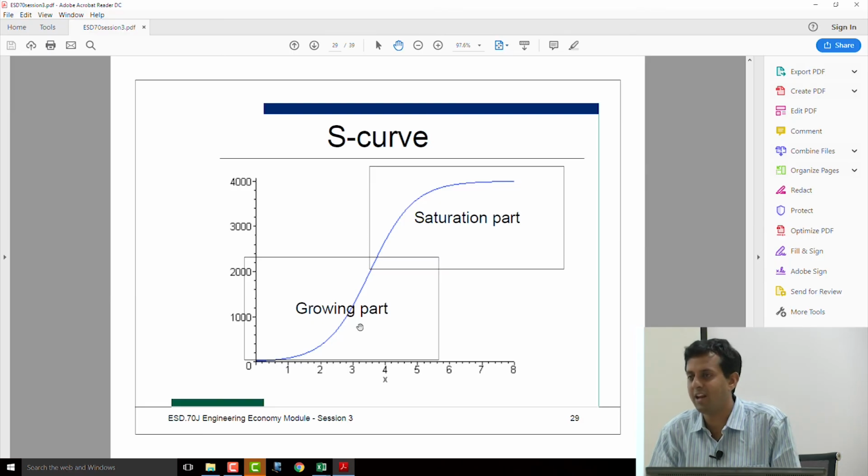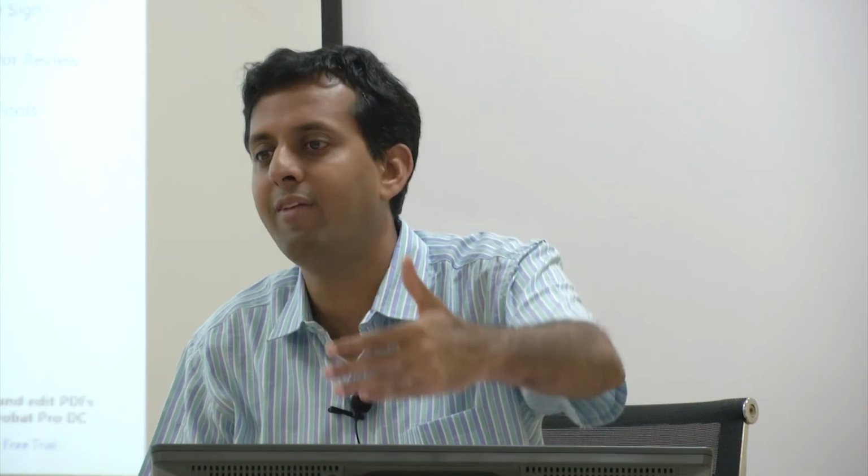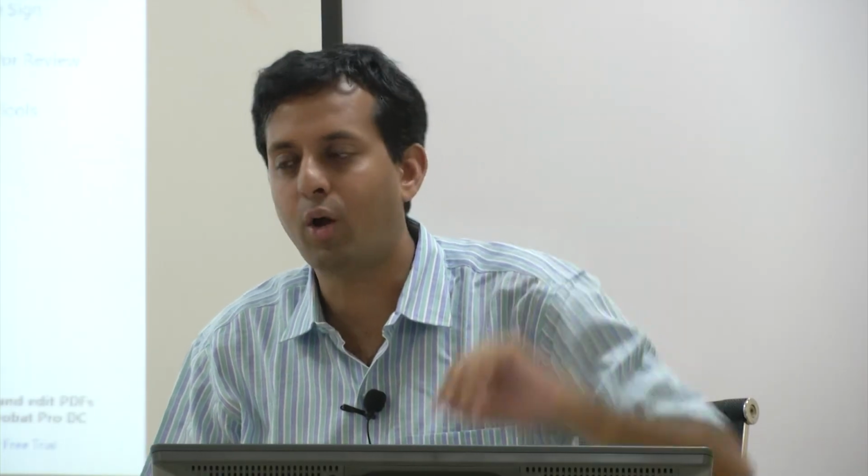For certain options, the increase in NPV might be negligible. There may be no return on NPV. Other options might have much larger NPVs. And then you can take that back to the person who's awarding the project and say this flexibility should be put in because it increases project value. So allow the developer to go from 2 lanes to 4 lanes or 4 lanes to 6 lanes at their discretion. Or you might put in the higher cost of acquiring land later on,